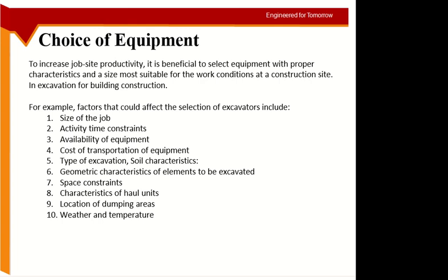What type of soil you are going to excavate? So remember, this is an example for an excavator. So the type of soil. For loose soil, the excavator could be different. For hard soil, hard rock, obviously the excavator will be different. And you may need to do some drilling or something else before you do the excavation.